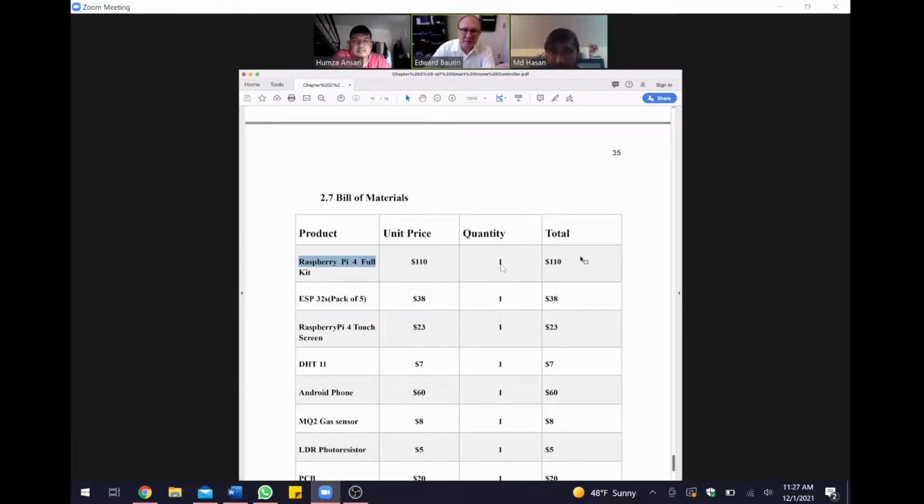So bill of materials and budget are connected, combined into one table. Because you can find both pieces of information on the same table. Bill of materials is just a list of all parts you need to buy and how much they cost. And budget is how much money you need to prepare for each month. That's true. Got it.